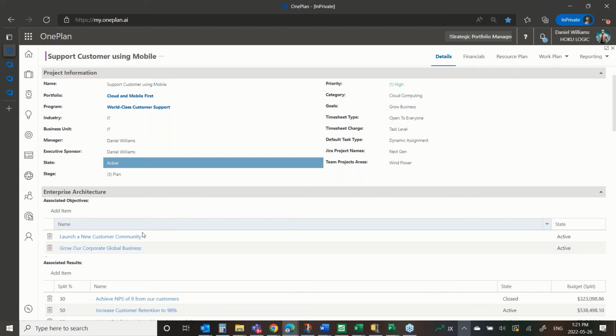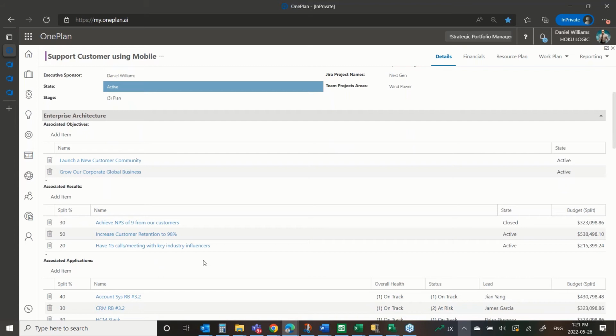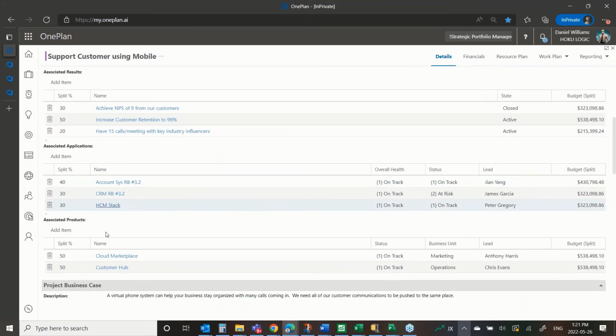This particular initiative is tied to 2 objectives. We just have created that linkage so we know that. It's tied to 3 key results, and we've split the budget accordingly so that we can start to understand total investment in achieving a key result by doing these splits. It's likewise tied to some of those applications, including the one I just had open a minute ago. And again, we've split the budget so that we have an understanding of total cost of ownership as we continue to invest in these various applications through the initiatives that we identify we need to do.